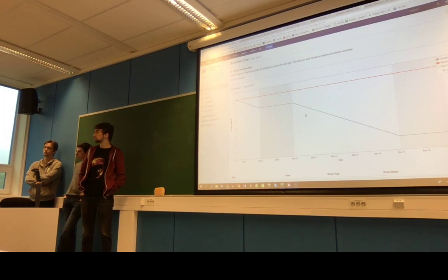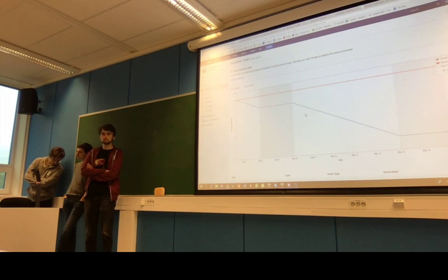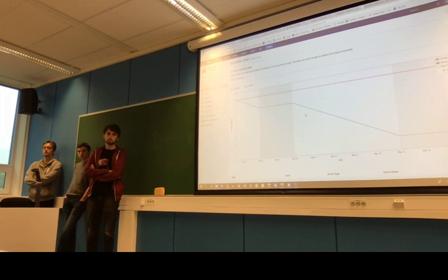Yeah. And I consider it a part of the learning process of doing this project with story points and doing the sprints, because I'm used to Kanban, which is a bit like the Wild West. So for me, as you say, it's a learning curve to adjust the story points. But it is nice to have a metric of how much the team could produce in a week. Exactly. That's the main value of it for me at least. That's right. And you agree on how hard something is in story points as a team, not individually, like, oh yeah, I can do it in 2 hours, therefore it's one story point. No. You all discuss and you say, oh, it's kind of hard, like two story points, and that's it, right? Even though you can do it in half an hour. Yeah.